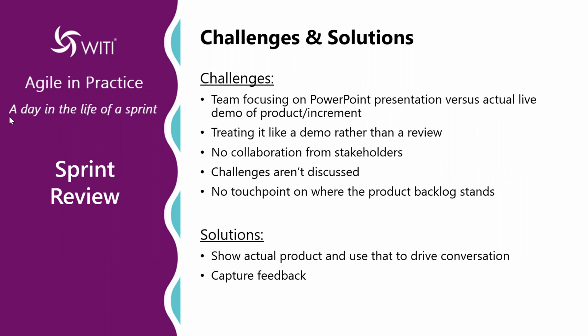There would be testing that gets done after each 2 week sprint, and then there is an end-to-end test that's done after the 4th sprint. That's when we actually go live. We don't go live after the 2 week sprint, right? There is something of significance that's being built, and then that gets pushed to production.